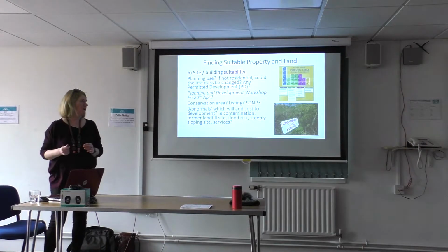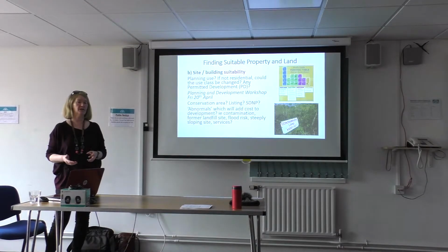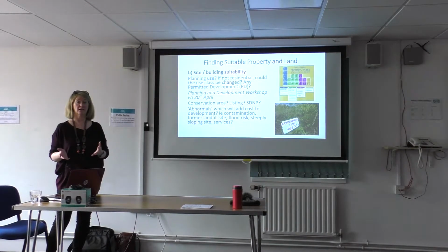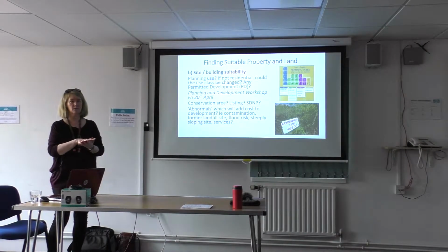Abnormals. What I mean by that is anything that's going to add cost and complexity to the development. So contamination, for instance petrol stations. There's quite a lot of them going, but the complications there are contamination and oil. It doesn't have to be really dangerous chemicals or anything, but it could just be oil that's seeped through the ground over a period of years.